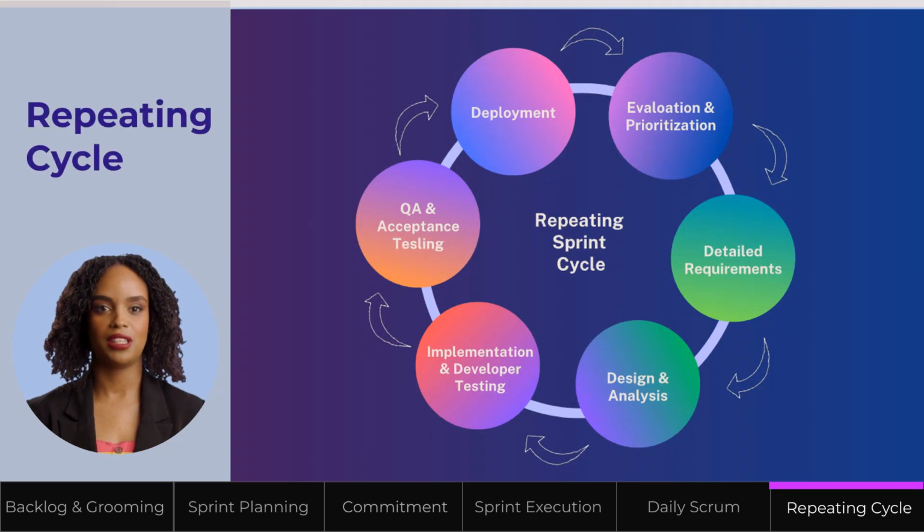Scrum team completes the sprint by executing an activity called Inspect and Adapt. First, during an activity called Sprint Review, the stakeholders and the Scrum team inspect the product. Second, during an activity called Sprint Retrospective, Scrum team audits the Scrum process that is being used by the team. The outcome of these 2 activities goes into a feedback loop through which the Scrum team improves not only the product being built, but also the process being used.